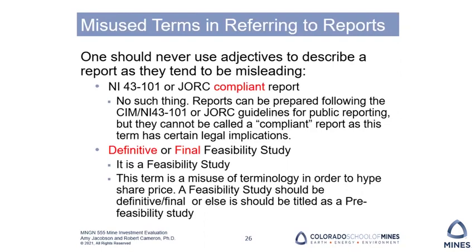Other things are the adjectives of definitive or final feasibility study. Again, no such thing. It's either a feasibility study or it's not. This term is a misuse of the terminology in order to hype the share price. A feasibility study, by definition, should be definitive or final. If it's not, then it should be titled a pre-feasibility study.